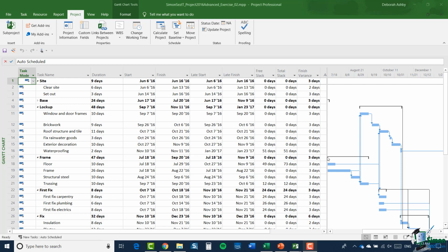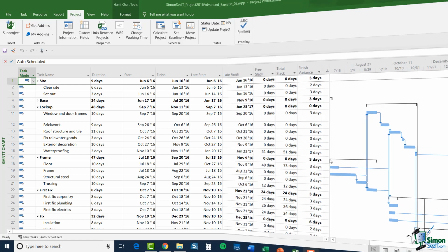So when you're dealing with anything related to duration, you need to be very aware of the fact that durations are stored in minutes. And for example, if you're working in elapsed days, you would need to proceed accordingly because of course an elapsed day is 24 hours. So we're talking here about a finish variance of 5 days or more.